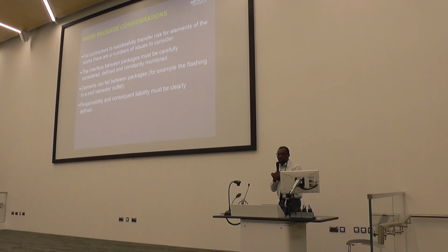Or in terms of tendering, you could look out for electrical subcontractors who have the accreditation to fix those items. So for you as a client, because you want those specific items, when you're doing your procurement plan, one key thing you identify is that any electrical subcontractor who comes on this project should have XYZ accreditation even before tendering. So we shall also fix it.